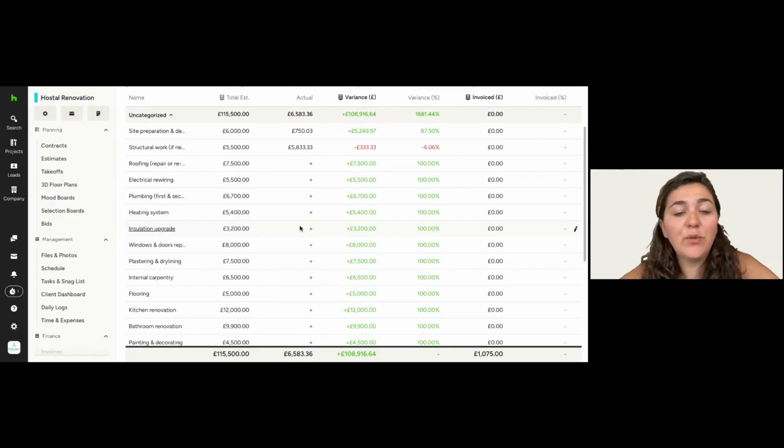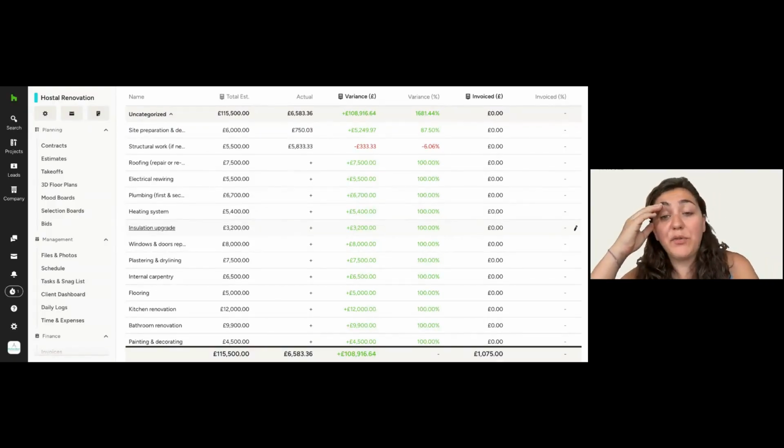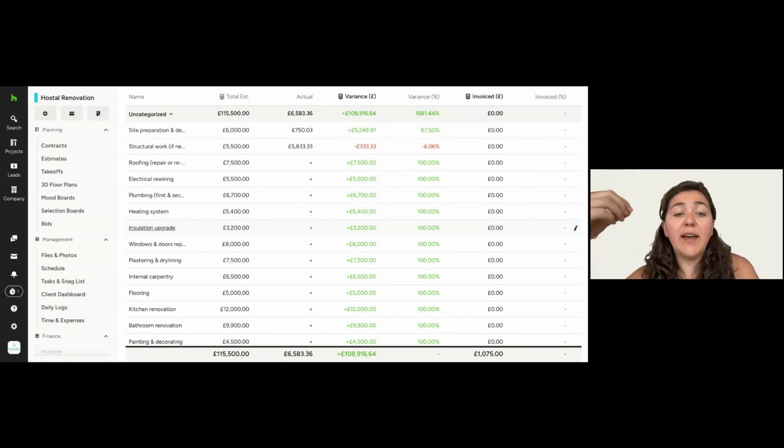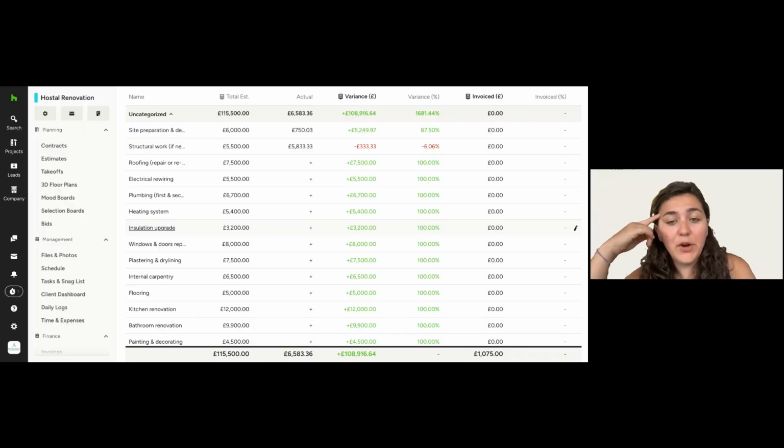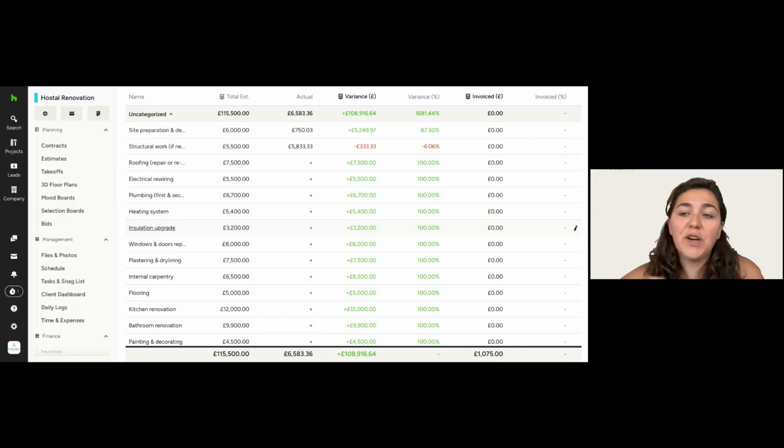But it's also a great way to actually monitor your performance and see, when you're starting a new project that you have had an issue of estimating because of X and Y reason. And so in the future, you will have to actually not apply the same price, but probably price it a little bit better to make sure that you're protecting your margin here.